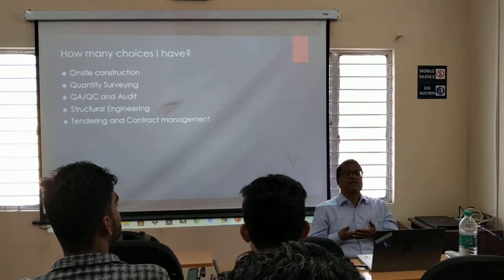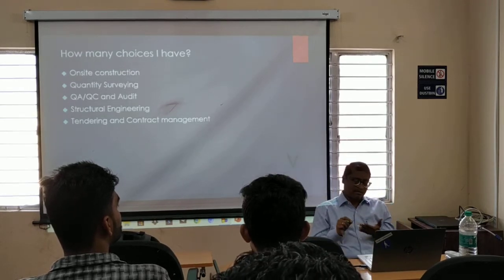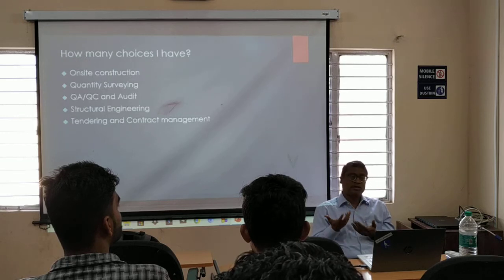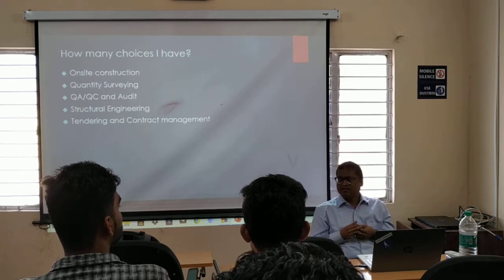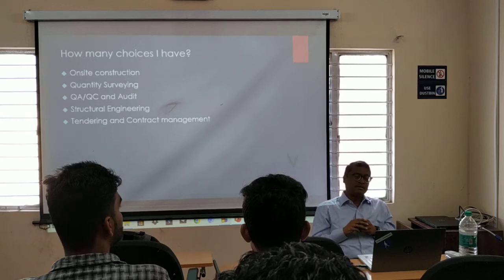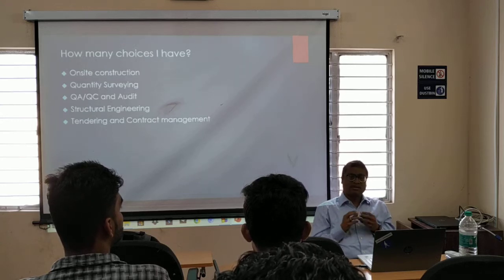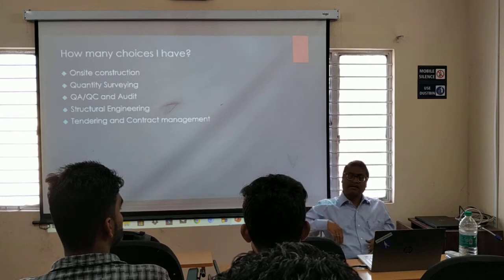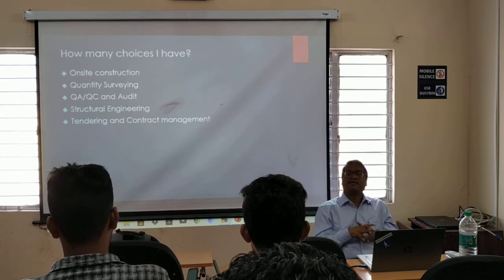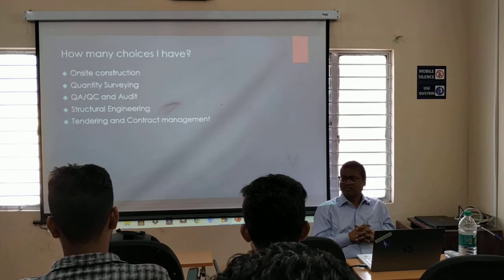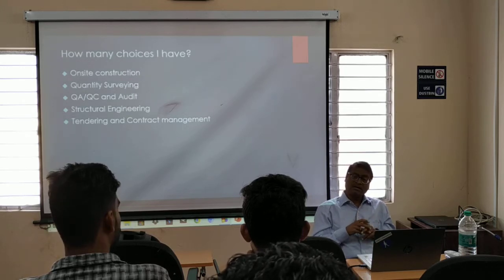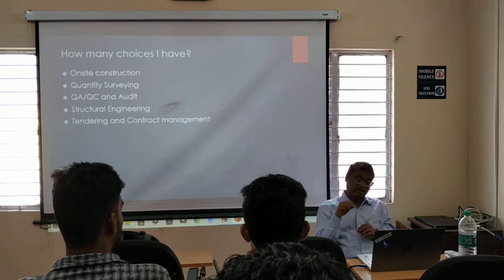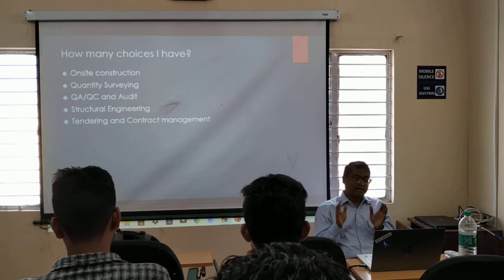Once you read the tender document, you will come to know what are the risks associated with it, and then you will work out a zero costing. Have you come across the word zero costing? No, I'm sure. Zero costing is the amount that it takes for any contractor without profit. This includes taxes, duties, your undercut, under the table, on the table, across the table, all that is included in that. There are some amounts they have to pay as fees to the government body, legally and illegally. All this is covered, and they work out a cost.